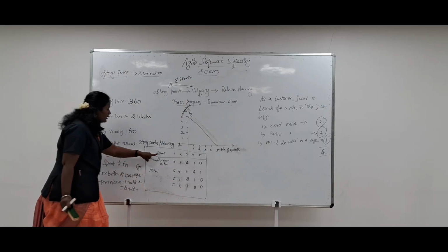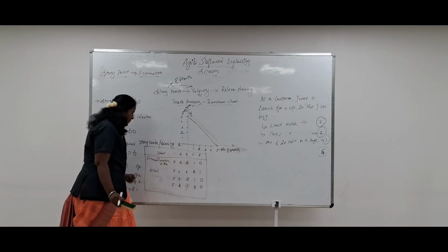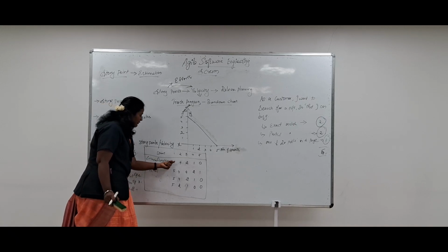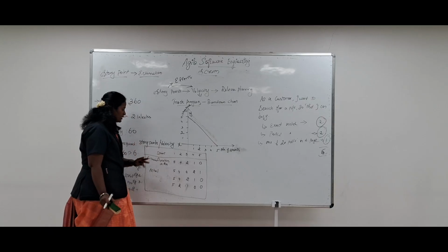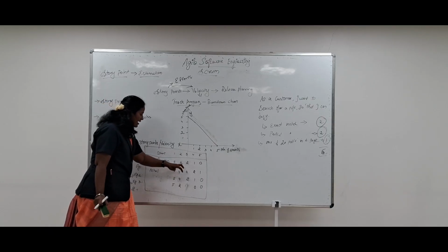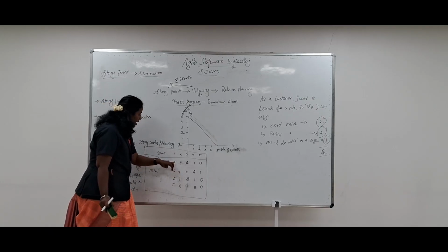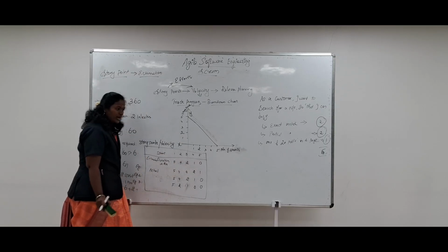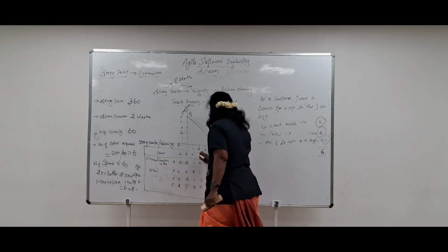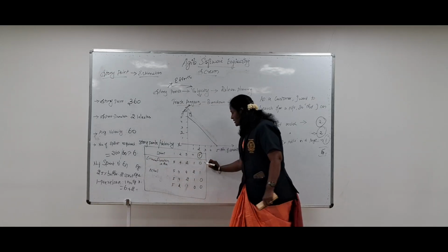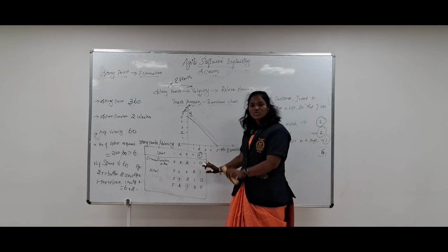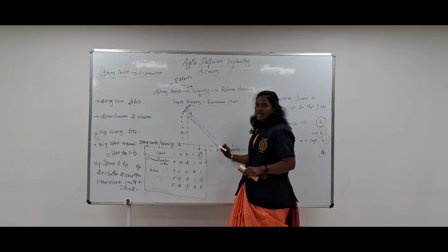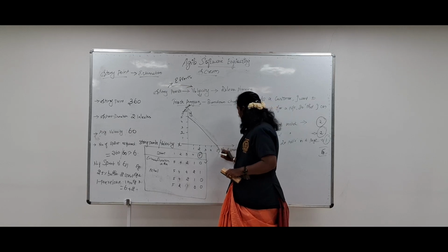There are 5 sprints, and the estimated duration I have represented in hours. Initially there are 5 story points, and then 5, 4, 2, 1 and 0. At the end of the 5th sprint it is completed. This is the estimation which we planned. This is the ideal line, a directly linear line has to be drawn.